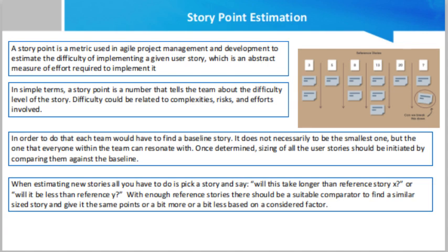While estimating story points, we assign a point value to each story. Relative values are more important than the raw values. A story that is assigned 2 story points should be twice as much as a story that is assigned 1 story point. It should also be 2/3 of a story that is estimated at 3 story points.